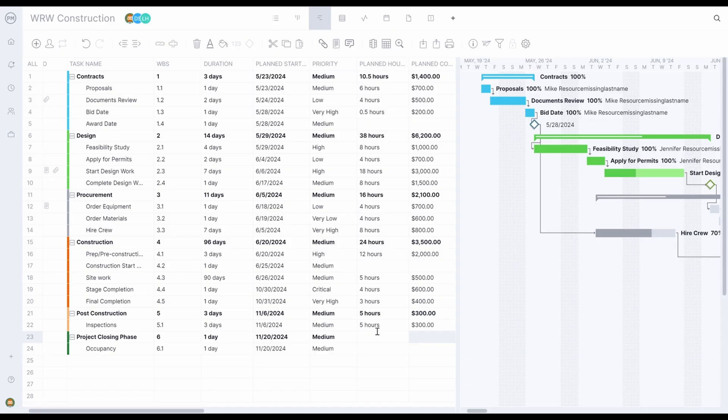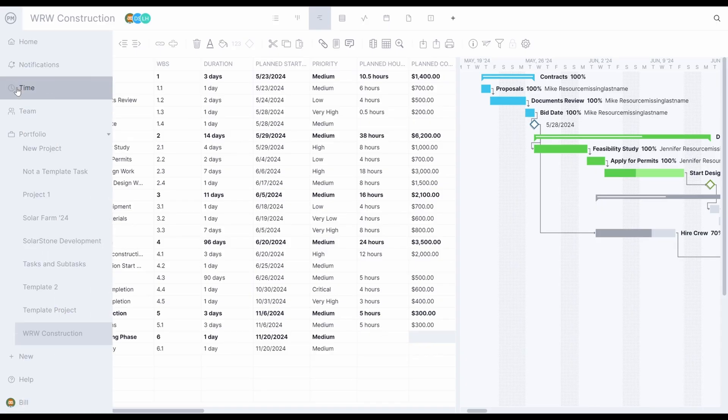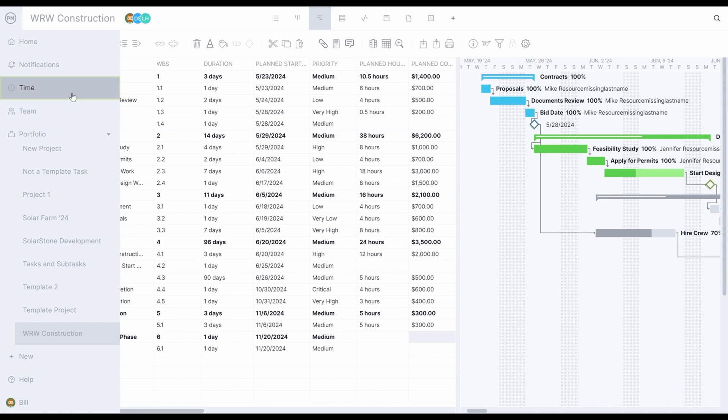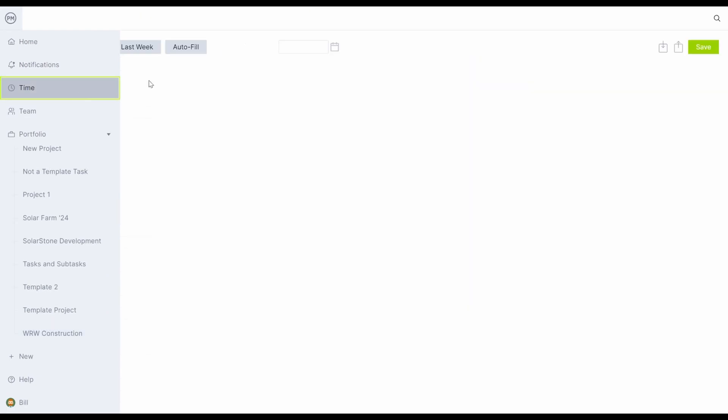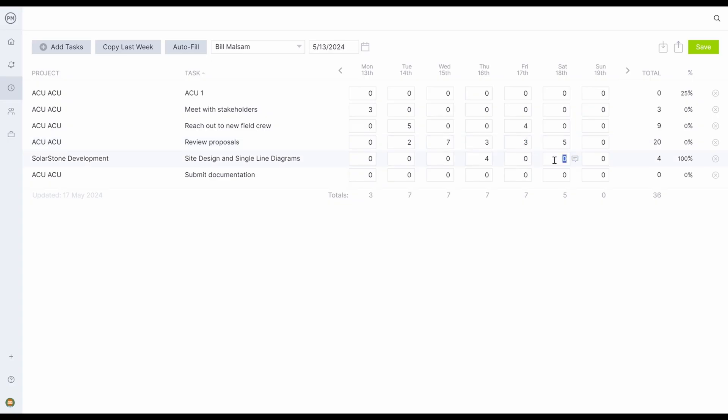In addition to the project portfolio management data that syncs with Acumatica, you can also connect the time and resource data from Project Manager. Project team members in Project Manager will appear in Acumatica. Timesheets in Project Manager will sync with time cards and actual resource costs will map as well.